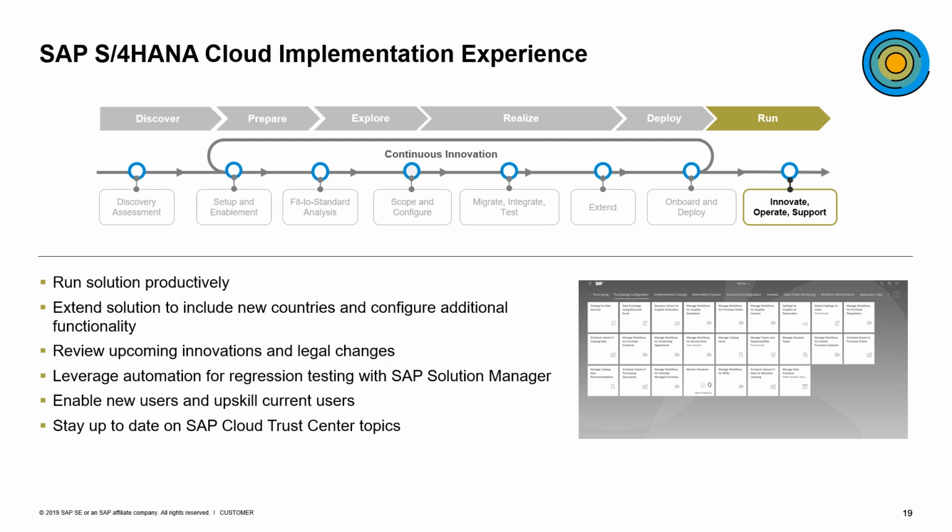Lastly, the run phase is where you would like to run the solution directly in the production system. This is also when you would extend the solution to include any new countries, as well as configure any additional functionality. You want to ensure that you review any upcoming innovations, as well as any legal changes that might have arisen since the start of the project.